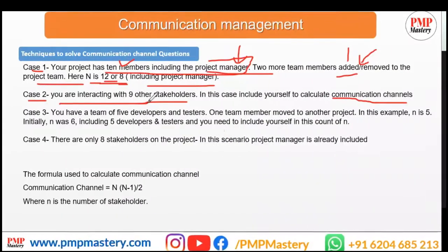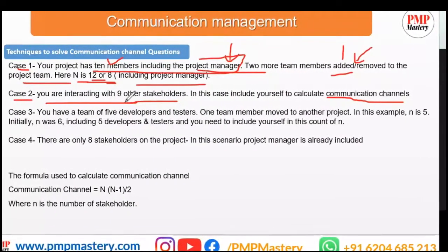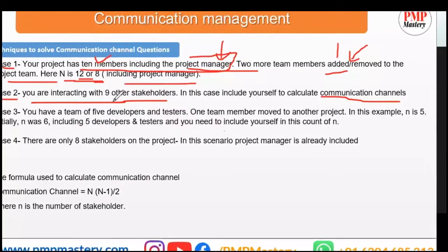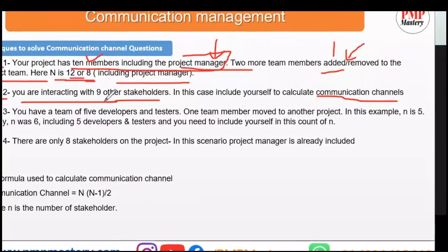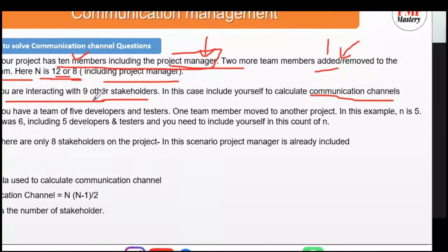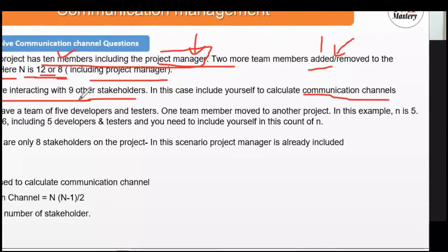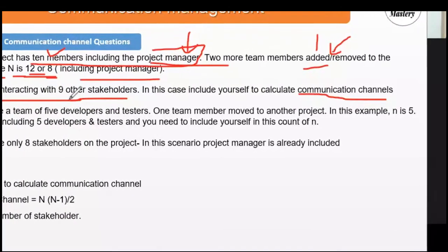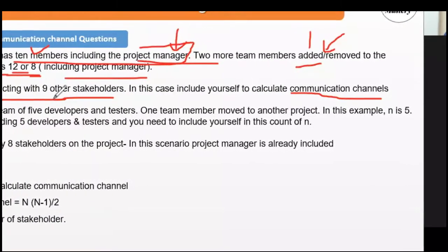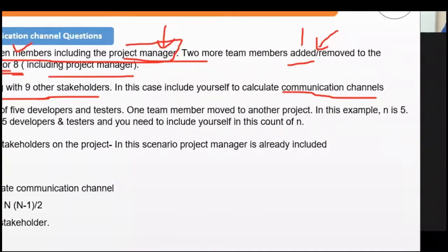Case two: you are interacting with nine other stakeholders and you are the project manager. In this scenario you have to include yourself. So it's one (you) plus nine other stakeholders, giving a total n of 10, and then you calculate the communication channels using the formula.